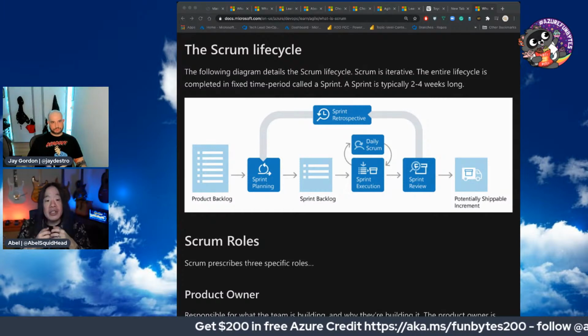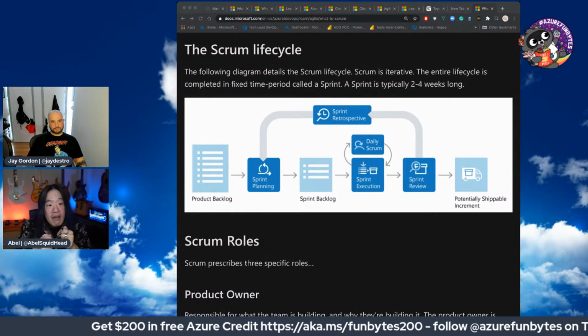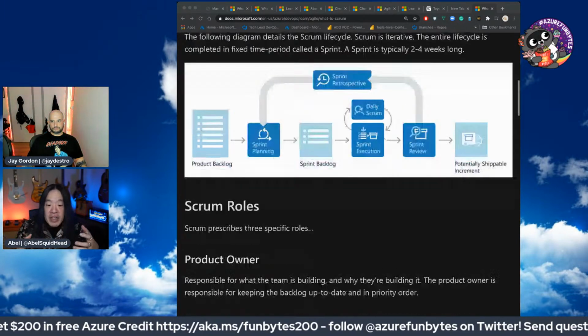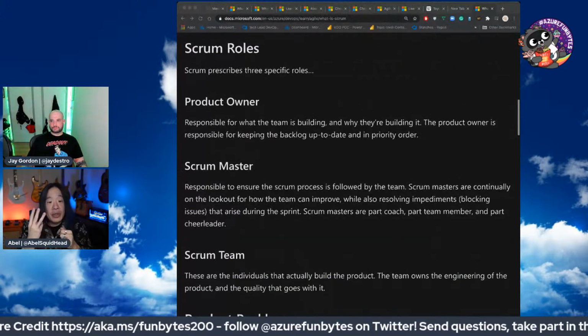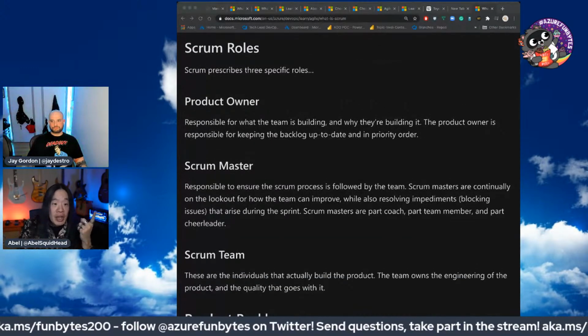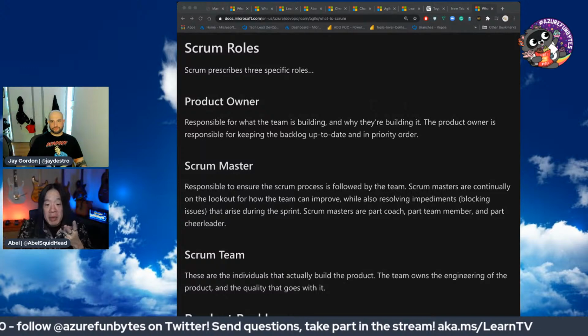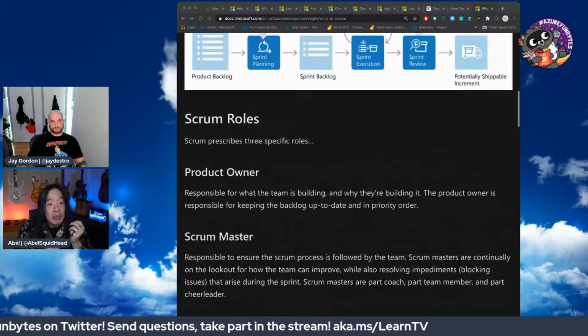And the first one is you need to have a daily stand-up where every single day, the dev team gets together and they list three things. What am I working on, or what have I been working on? What am I going to be working on next? And are there any blockers?